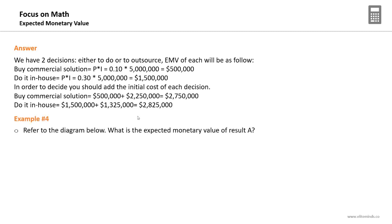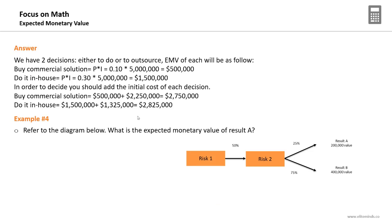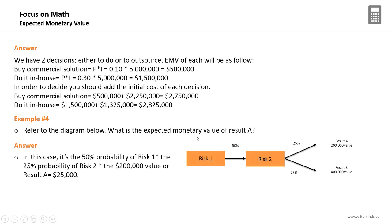Another example: refer to a decision tree diagram asking for the EMV of Result A. The trick is that Result A has a $200,000 impact and 25% probability, but you must also consider the 50% probability of reaching that branch previously. So the EMV is not just 25% × $200,000. It is 50% × 25% × $200,000 = $25,000 USD.